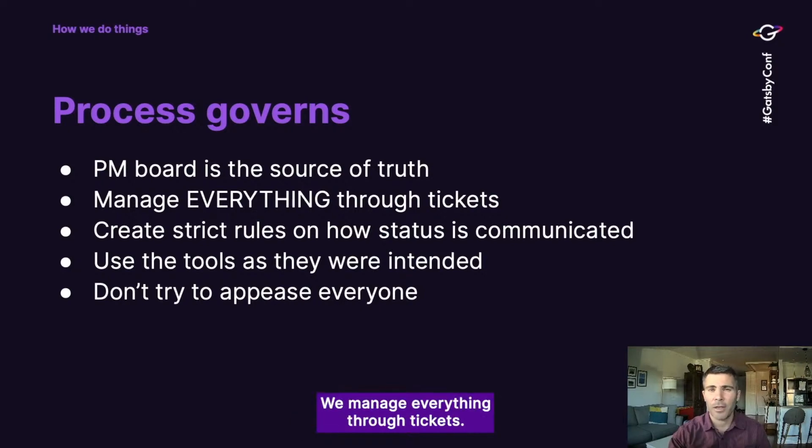We manage everything through tickets. That doesn't just mean that we're putting a ticket on our board and that's all we're doing. Whether it's documents, comments, anything like that, we manage that through tickets. So rather than having open Slack channels, we drive communication through that ticket so that if there's ever any question of did something get communicated on a task, there is a single source to go through rather than having to rummage through really large backlogs of Slack conversations.